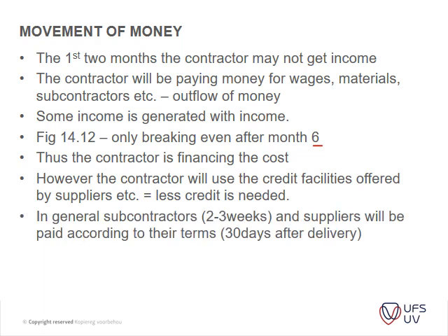In general, subcontractors you pay within 2 to 3 weeks, and suppliers will be paid according to their terms, 30 days after delivery or so. And it really depends on how it works. In South Africa, it's very much a system of get paid when you are paid, which the new contracts are trying to alleviate, because some of the subcontractors did suffer quite a lot through this process. Okay.